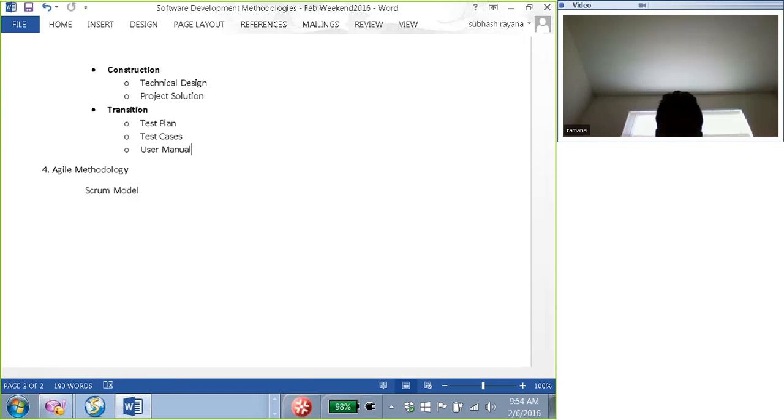Normally, the requirements gathering phase will have a start date and an end date, right? So the end date technically is the cutoff date for any new requirement that can be consumed. And even after your requirements are complete, normally dates are documented from a process perspective.